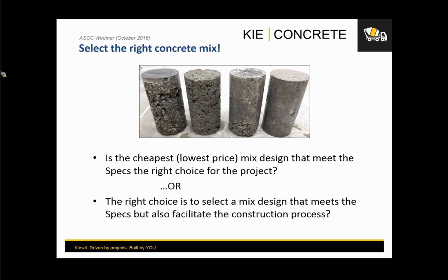And remember, I'm telling you this from a contractor organization. Think about it. It's not necessarily about the price, right? The cost to a contractor is more than just the price of a mix. It's the field, right? It's how long you expose your labor to safety incidents, right? Or how much you spend in the field, right? And how much you have to go and do rework, right? That's the cost. That's really true cost. Sometimes it's not that easy to understand, but it's something that you need to consider.